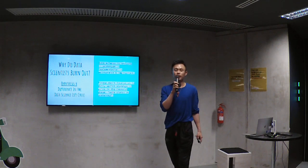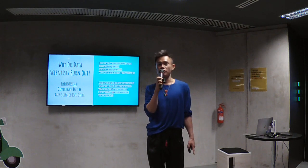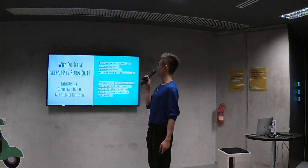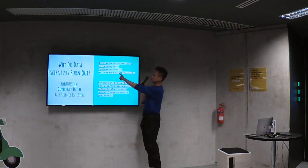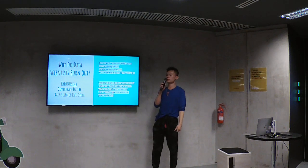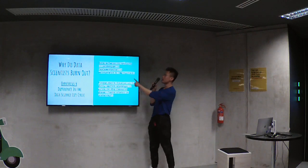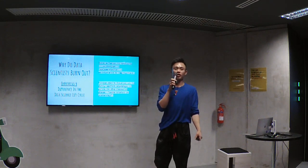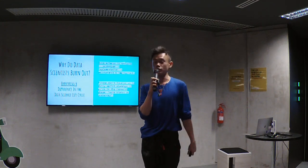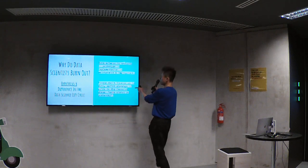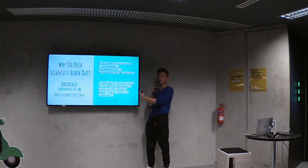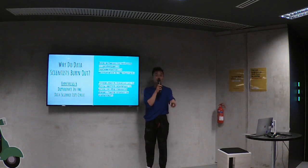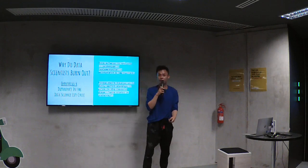This point is important: the data science life cycle is very different from the product or engineering life cycle. In engineering, you tend to go from prototype to implementation to deployment to maintenance and improvement. But for us, there is a front-loaded analysis portion, because we're not going to execute unless we have a fairly good idea that it's going to produce good results. How many of you have been in daily sprint stand-ups where you're expected to say, 'I'm still researching, same as yesterday'? Very exhausting.